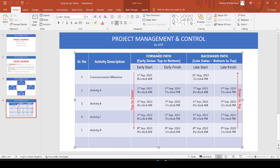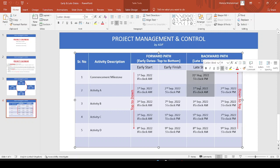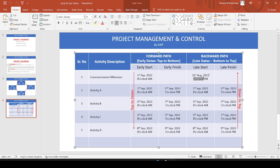One issue is that the project commencement milestone and the first activity (Activity A) should be linked correctly. If it is linked with Finish-to-Start, when we run the backward pass, Activity A must finish before the milestone starts, so the commencement milestone would have to finish on 31st August at 5 o'clock. This causes the late start and early start not to coincide. To solve this, we should change the link from Finish-to-Start to Finish-to-Finish, so that the commencement milestone finishes at the same time Activity A starts. Let's go back to Primavera to see this in more detail.